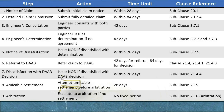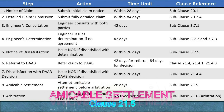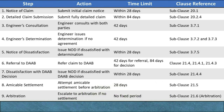Step 8: Amicable Settlement (Subclause 20.5). Action: If a notice of dissatisfaction has been issued after the DAAB's decision, the parties must attempt to settle the dispute amicably before proceeding to arbitration. This phase offers a final chance for informal resolution. Time limit: The parties have 28 days after issuing the NOD to seek an amicable settlement. If no settlement is reached within this period, either party may proceed to arbitration. Clause Reference: Subclause 21.5 — Amicable Settlement. Purpose: This phase provides an additional opportunity for resolution outside of formal arbitration, potentially saving time and resources for both parties.